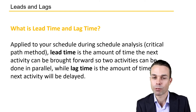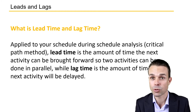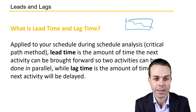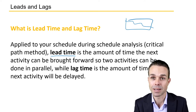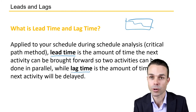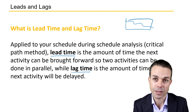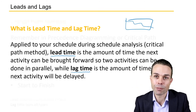Lead time and lag time apply to your schedule during your schedule analysis — looking at the critical path method, finding that critical path, and determining what the shortest duration your project can be. Lead time is the amount of time that the next activity can be brought forward so two activities can be done in parallel. Lag time is the amount of time that the next activity will be delayed — it is lagging behind. Lead time we are leading it forward.